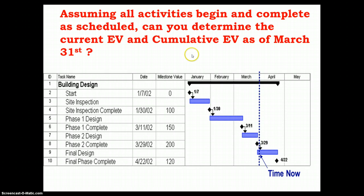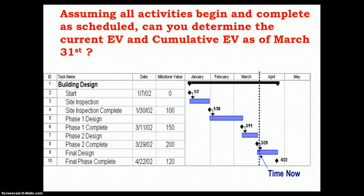Assuming all activities begin and complete as scheduled, can you determine the current and cumulative earned value as of March 31st? By end of March, two milestones have been accomplished: phase 1 completion with a milestone value of $150,000, and phase 2 completion with an earned value of $200,000. The current earned value for this period is $350,000, and the cumulative earned value by March 31st is $450,000, achieved by completing all three milestones.